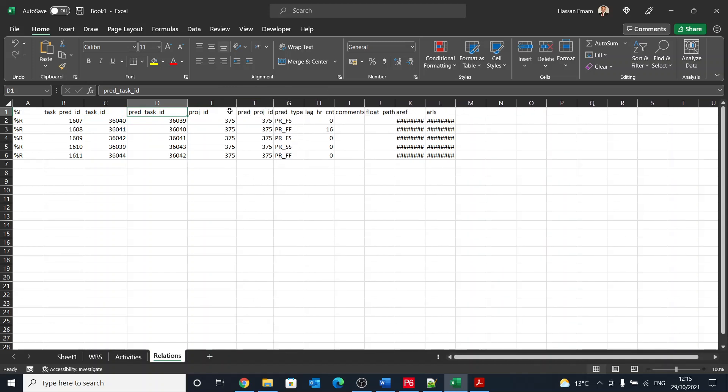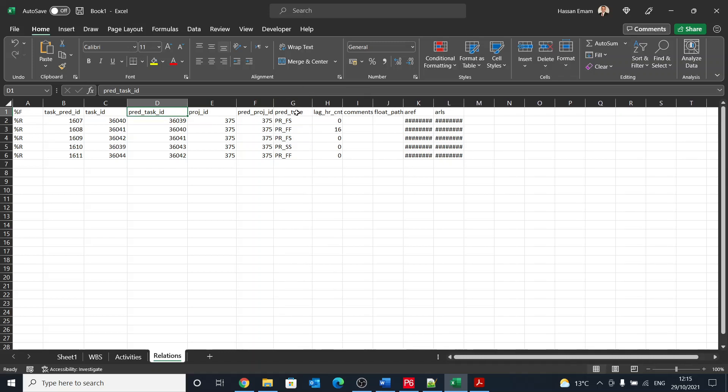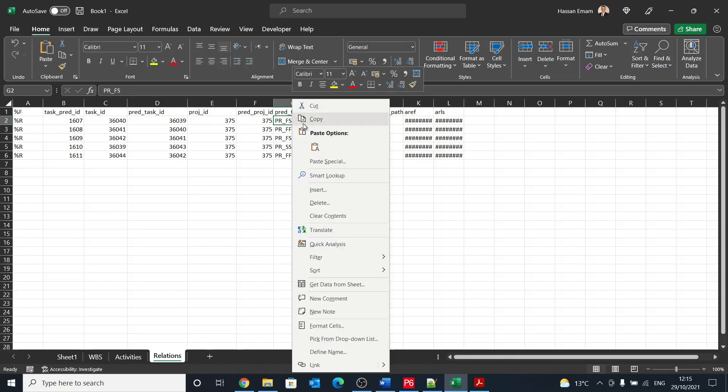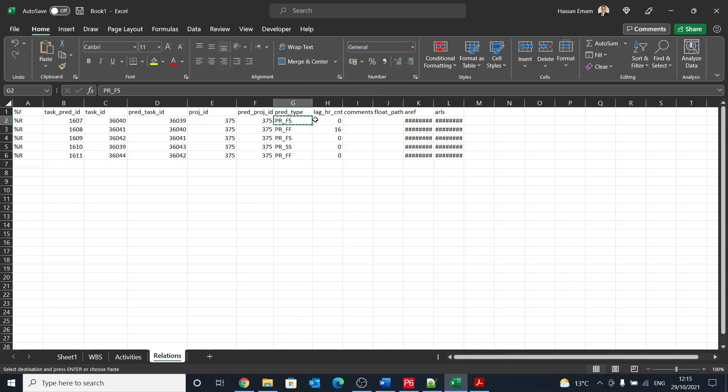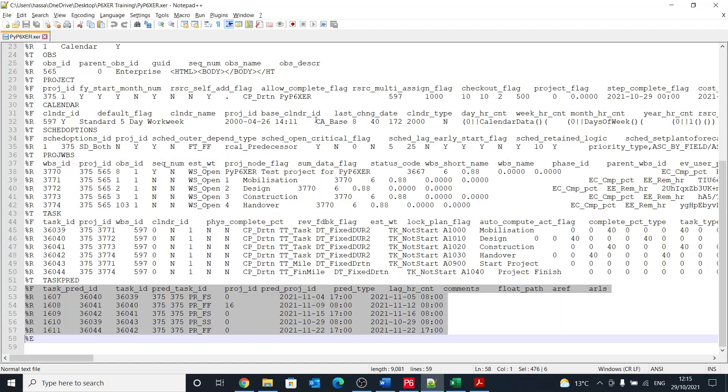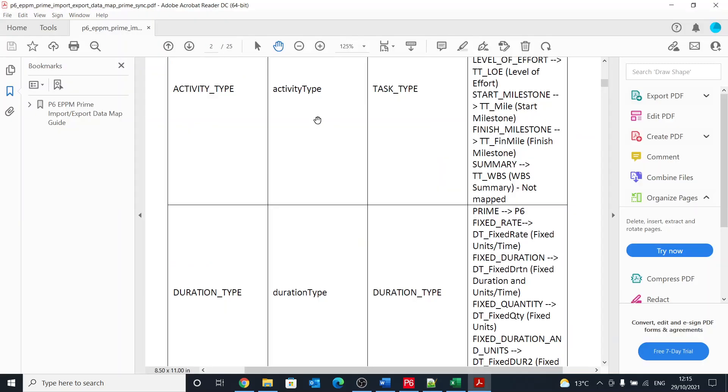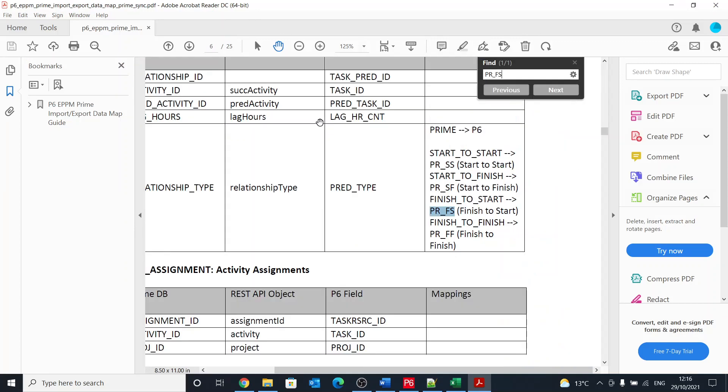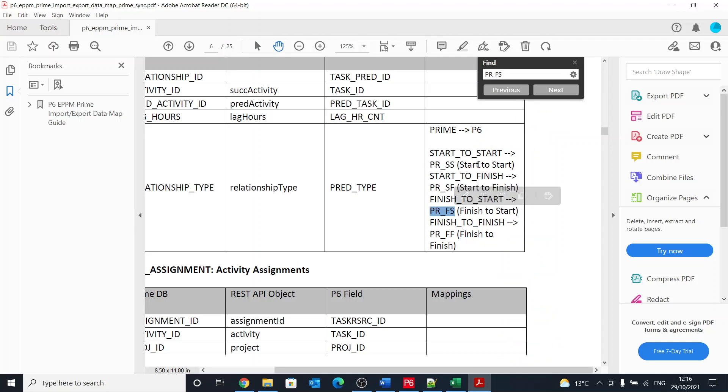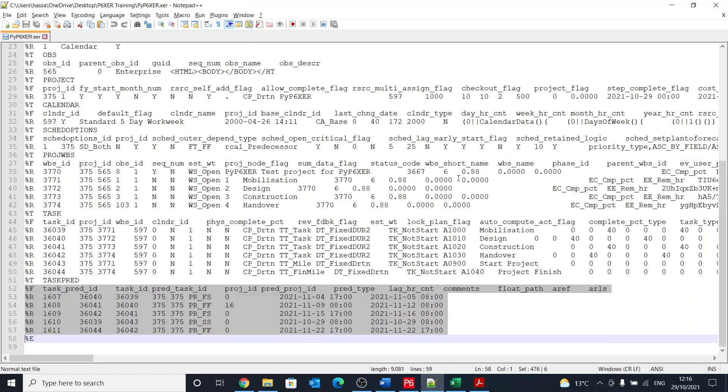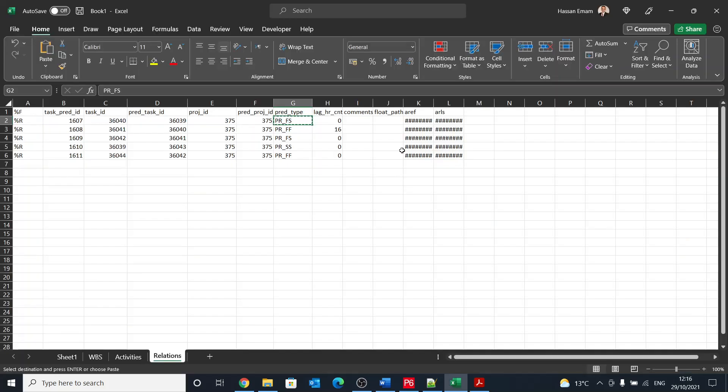And the project ID, because if you're referring to different tasks or linking tasks between different projects, which is quite common. And then you have the predecessor type or the relationship type. And that's again, if we can go back to this document and search for it. Yeah, so PRFS is finish to start, PRSS start to start, and so on and so forth.